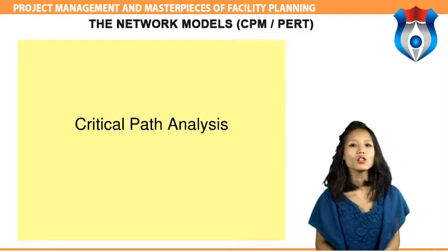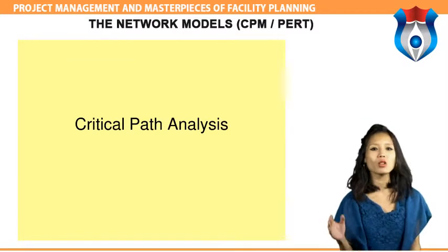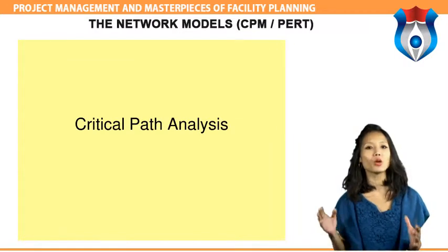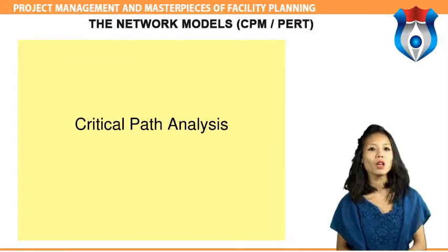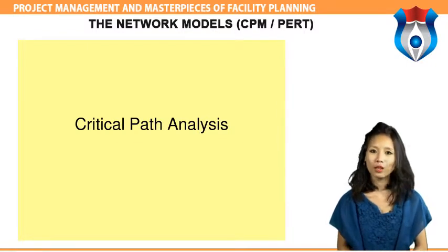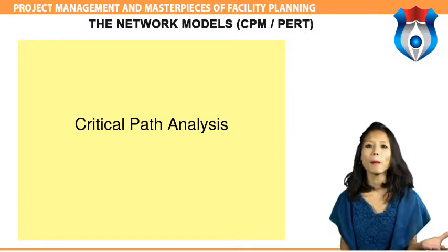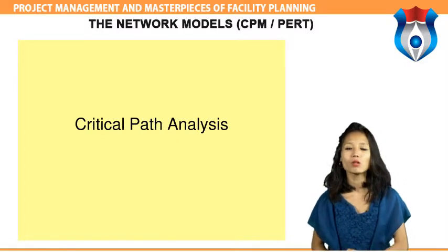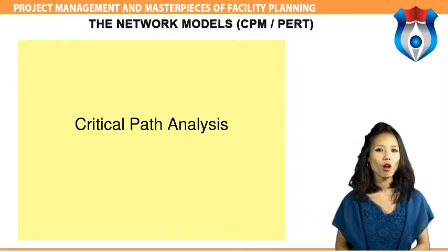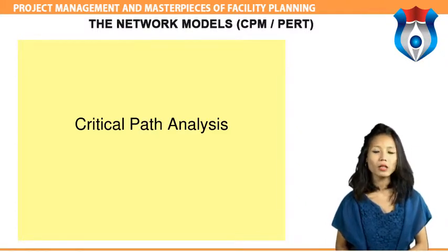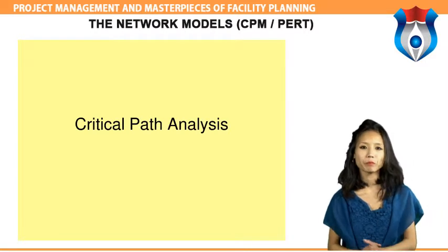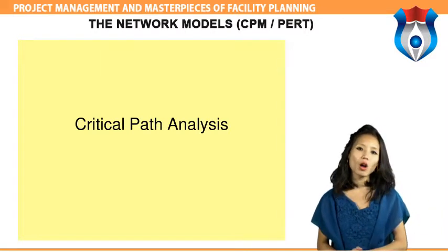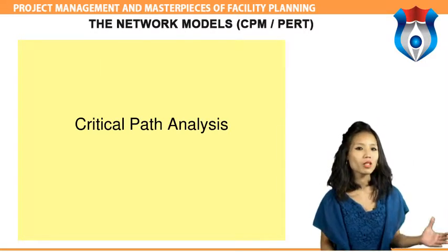site. In order to construct a CPA, it is necessary to estimate the elapsed time for each activity, that is, the time taken from commencement to completion. Then the CPA is drawn up based on the dependencies such as the availability of labor and other resources, lead times for delivery of materials and other services, and seasonal factors such as dry weather required in a building project. Once the CPA is drawn up, it is possible to see the critical path itself.